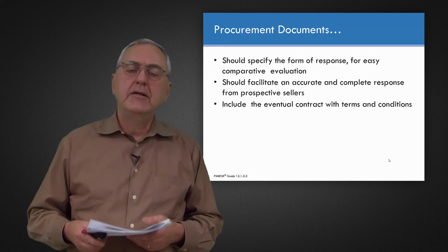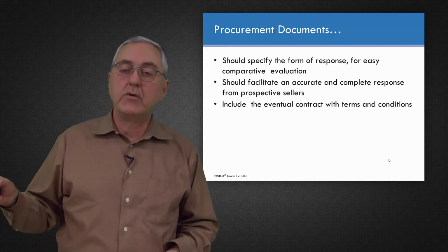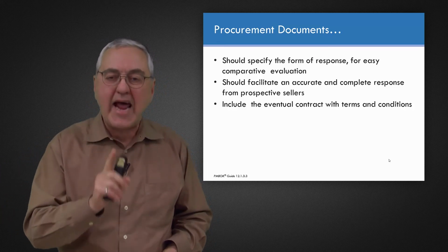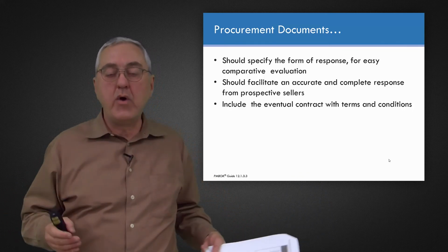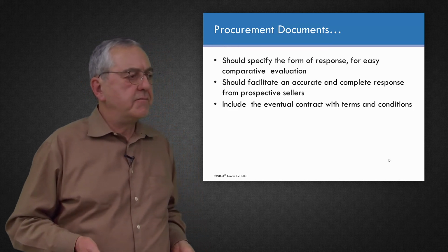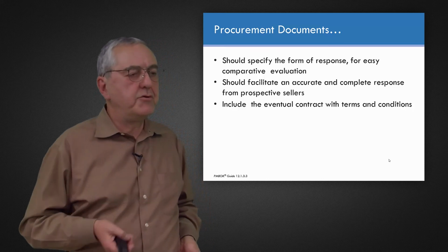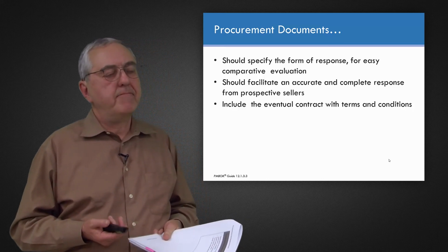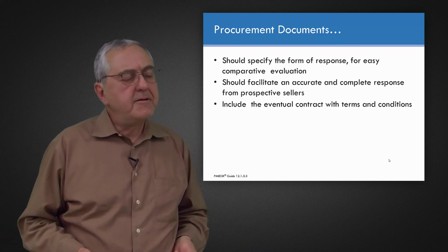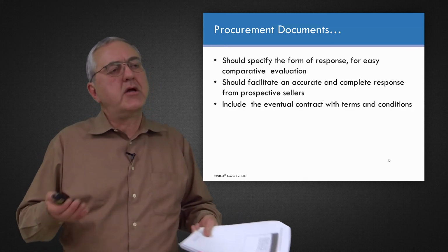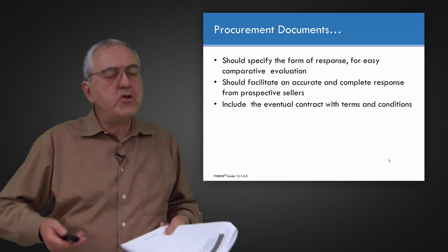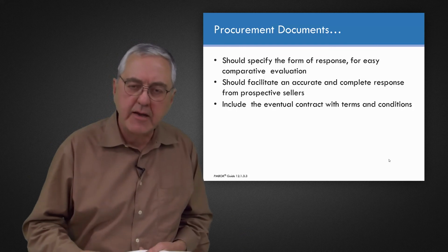And you also want to make sure that when you go to the marketplace with a request for quotation or a request for proposal, you give them the terms and conditions that will be attached to the contract that you will eventually want to sign with one of them. I remember on a number of occasions getting requests for proposal from a company for consulting services. And they're used to asking for design services, and their eventual contract will say, we want you to have professional liability insurance. Well, myself, when doing management consulting, I do that without professional liability insurance.